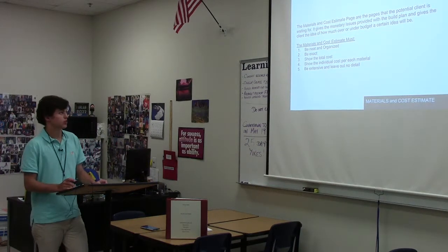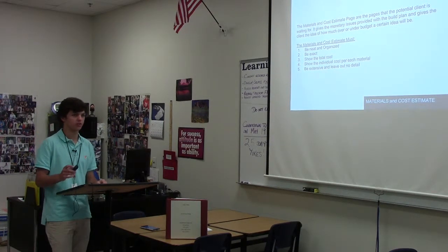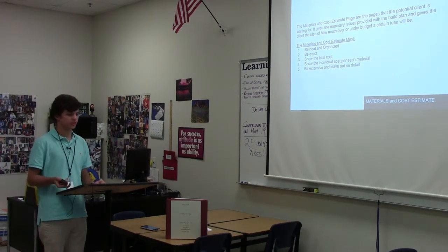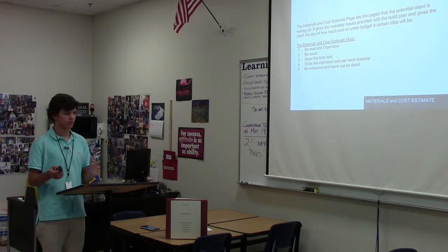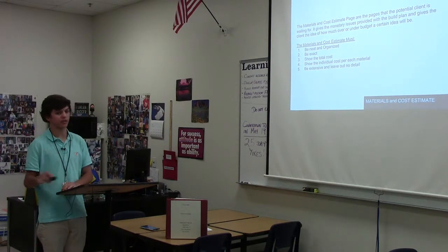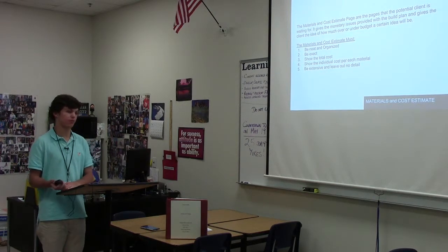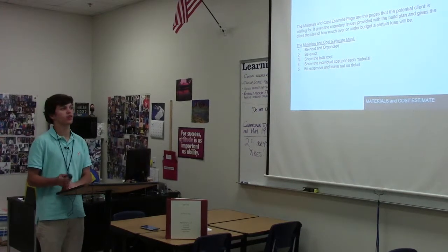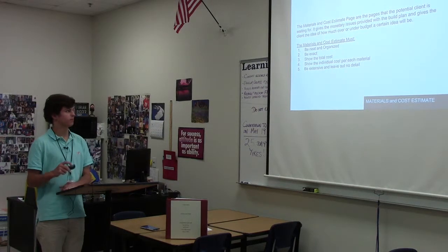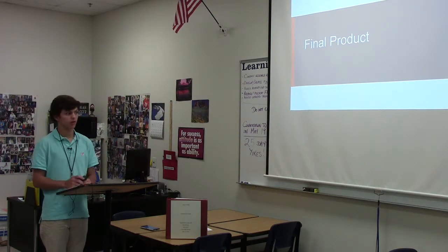The materials and cost estimate pages are needed for potential clients, so that the client can see how much you're going to spend, what the budget is, and how much money they're going to have left over for other things. It lets the client see where you're at monetarily. So it needs to be exact, and you have to think of everything that's going to cost money. Since we were building it ourselves, we did not put labor into the price, but if you had to hire someone to work for you, you'd have to make sure the labor costs were also added into the cost estimate.